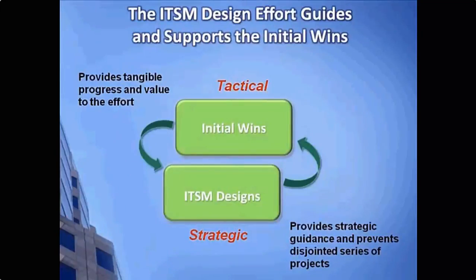Here's why we've split the initial wins out from the design and treating them a little bit separately. If only the design activities were done, in other words, all you're doing is spending your time building your process, putting your process resources into place, designing the process steps and how the process will work. The end result is that I may have a very strategic solution from a process perspective, but at the end of the day, the business still really hasn't seen anything positive necessarily from that effort. It may not be something that they can see or touch.